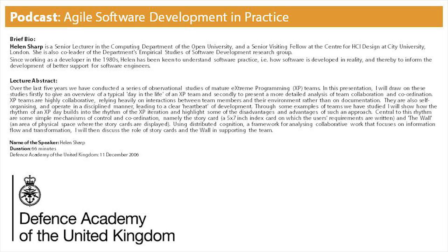Customers are involved, and they are supposed to prioritise stories. So they will say, these 5 have to be done this week, these 2 have to be done this week, whatever. If the developers come back and say, all right, you've said 5, but that requires more time than we have available, which ones shall we not implement this time? The customer makes that decision. That's the idea. In reality, you have customer stories and you have developer stories.